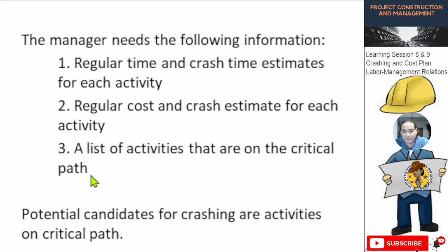The manager needs the following information. Number one, regular time and crash time estimates for each activity. Usually, if this data is prepared, the good person to give you the right data is the actual supervisor who is in charge of that work or those activities.